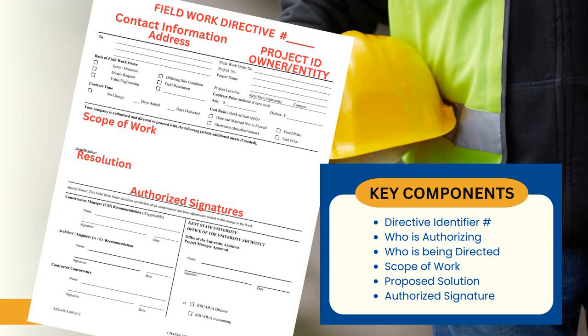And that is, again, identifying what number of field work directive this is, who is doing the authorization of this field work directive, who the work is being directed to, what the anticipated scope of work is, what the proposed resolution was that came up at the time that we were able to meet on site, and where the authorized signatures are for 100% buy-in for everyone that is taking care of this situation.